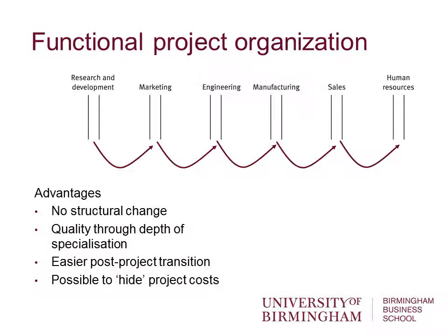It's possible to hide project costs. By this I mean that the costs of the project get lost within the general activities of the functions which are carrying out the project. This means that projects often can happen which might otherwise not happen. That's important to organisations because they need to change, and projects are about delivery of change within organisations. If they don't change through project activities, then they ossify, they get overtaken by their competitors.